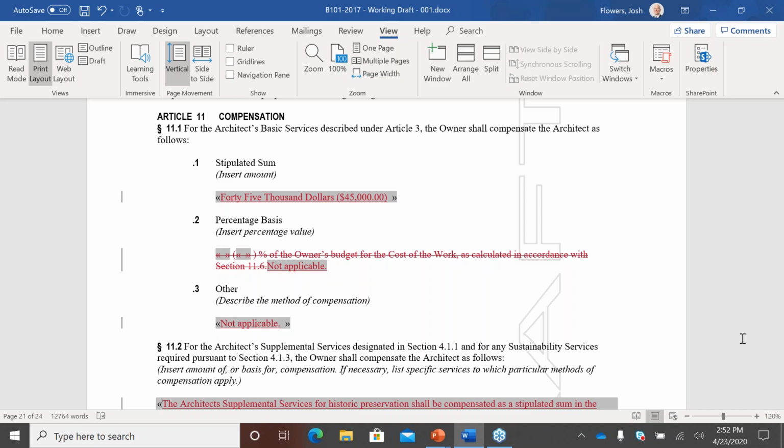If that's something that has been disclosed, it may be part of a more complex fee structure where you would prefer to reference a fee matrix as an exhibit to the agreement. If there are multiple separate line items that make up the architect's basic fee, that may be something where it's more helpful to see that information in tabular format in an exhibit. But that's something that you can determine how it works best for the project. But typically the architect's basic services compensation would include anything that the architect is providing as far as consultant services under the architect as the prime consultant to the owner.